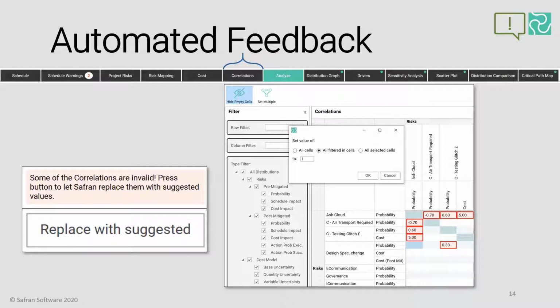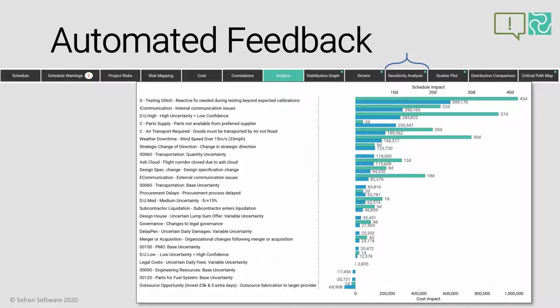The sensitivity analysis is one of the better examples of how Safran Risk automates a laborious task that you wish was done easier. And when you do this manually, you may accidentally introduce human error, of course, as well, which can be a drag on your time later if you have to reperform a bodged analysis. But what we have here with Safran's sensitivity analysis by exclusion method, as advocated by David Hulett, is essentially knocking out one risk at a time, then measuring the delta.